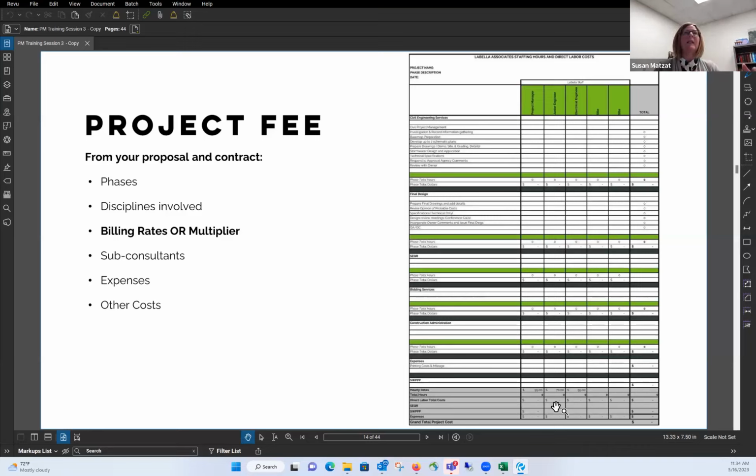If we are pursuing, let's say, protection and control, they may have openings this month, but if engineering is delayed, for example, and next month we're number 13 in the queue, the response is not going to be 2 weeks.